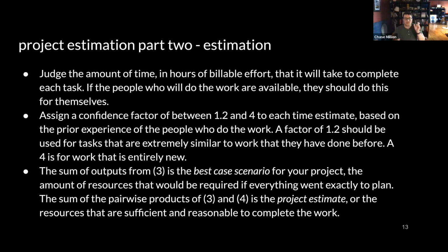When possible, the people who are going to do this work should be the ones making the estimate. There may be a few exceptions, like if you're working with new grad students who don't have a lot of experience, they might not have a good basis to make these estimates. But if you're working with career professionals, those are the people who should be making these estimates for themselves. They will be in the best position to judge.